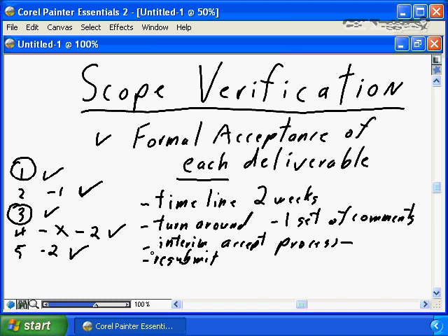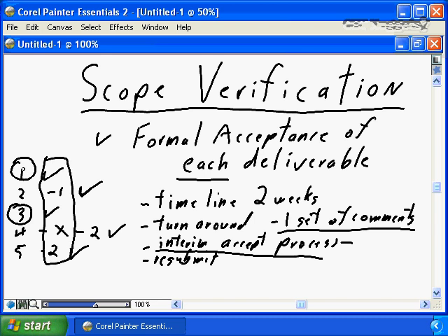The importance of this interim review process, very much like the importance of getting a single set of comments, is it prevents change and rechange and rechange and rethink. If you made these first set of changes on the first submission and the whole document was open for review and revision, section number 1 may require changes this time, or section number 3 may require changes this time.